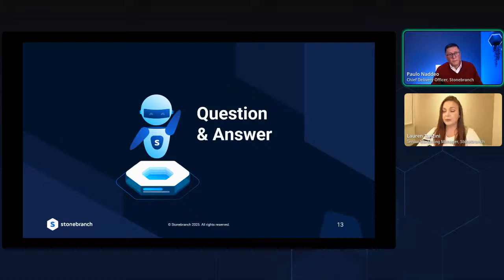Once you decide to replace your workload tool, you will not have time to do the cleanup, and we cannot ignore jobs that are present in the extract because of the dependencies, right? So some legacy platforms allow you to disable jobs but keep them there, and that does not do good for the transition, right? So in some cases we can isolate those jobs, but in others we cannot. So the best thing you can do is to understand your workload and clean it up before you start the project.